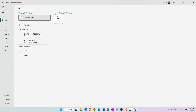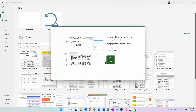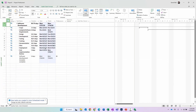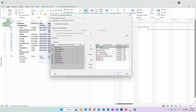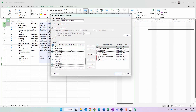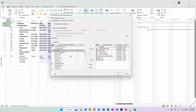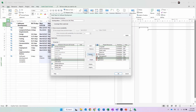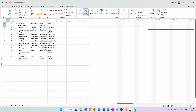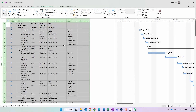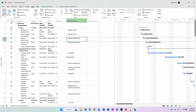If I were to open up a blank project or select File > New and use one of these handy templates and click Create — if I were to click Control+T now, like we said before, the resource pool sync's main job is to make sure these resources show up here to be added to the team of my project so they can be assigned to tasks. At this point I can replace my Analyst generic with Craig Bell, replace the Deployment Team generic with David, replace Project Manager with Mr. Shackelford — he's a project manager — Technical Communicators, Testers. I can go through and make changes, replacing Management with Megan. If I go to View and click Show All Subtasks, you can see I've replaced all those generics with the resources that are part of my project team.